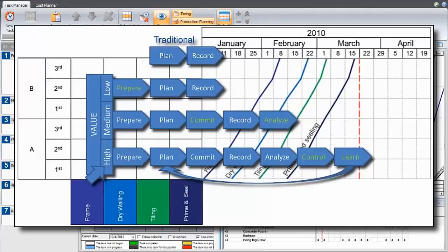Analysis of actual productivity data provides us forecasting and warnings of any potential clashes in the field, and we use these forecasts and the alarms to inform site meetings, implement mitigation measures, and really control the plan. We then complete that learning loop to provide better starting data and improve our next plan.